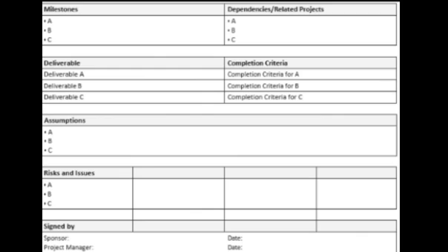Now, the next milestone, which is milestone B, could then be raising of the blocks of the house to the roofing level. You understand? Also, you state how long it's going to take for you to raise the blocks of that house to the roofing level. Let's assume it's also going to take 1 week. You write when your 1 week will start and when the 1 week will end. You can say, okay, that 1 week is going to be from 10th of June to what? 17th of June. You understand? So that's your second milestone, starting 10th of June to 17th of June. Then the third milestone could then be the roofing of the house. How long is it going to take for you to roof that house?